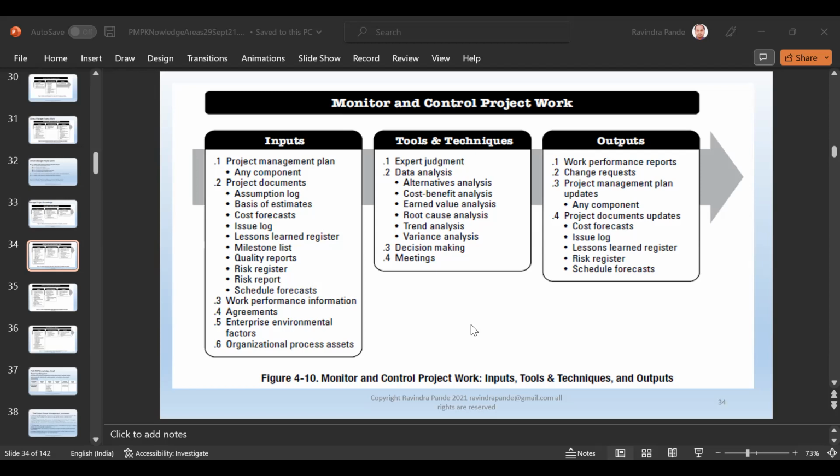So any and all persons included in the project organization are normally referred to for certain tasks like management guidance, overall reviews and audits, and so on and so forth. The project documents we normally consider as additional documents to any management plans are assumption logs. Whatever we assume for a given project, it can be as simple as, let's assume last year there was a snowstorm, this year there won't be a snowstorm. Again, every such assumption gives rise to a risk, and we might add that risk in our risk register. A risk register is just a list of risks with the weightages, score, cost, and the resources allocated to that risk, and so on and so forth.